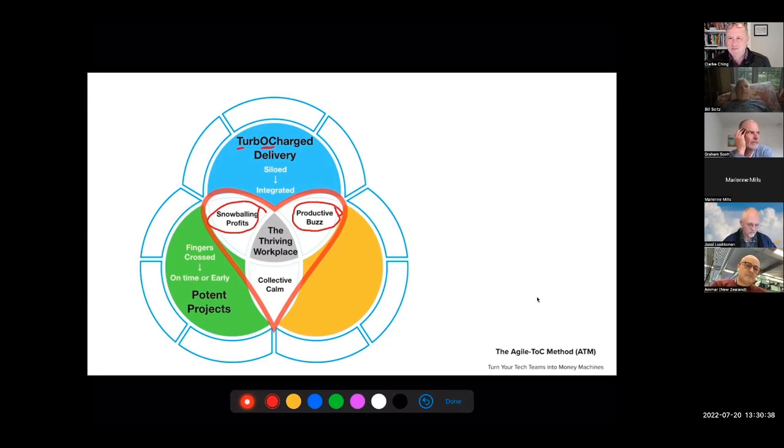What it says is that if I'm building a brand new product, and it needs to go live in November so that I get the Christmas rush, then it's really important that it goes live in November or early December rather than January or February, because you can spend a huge amount of money on it and end up not making very much money back because you missed that moment.